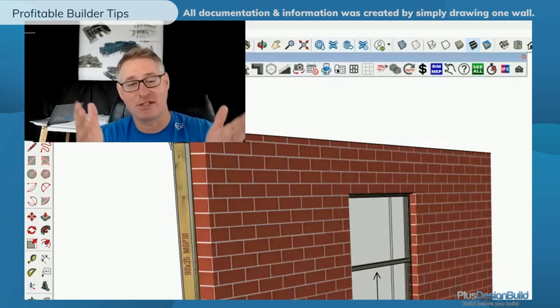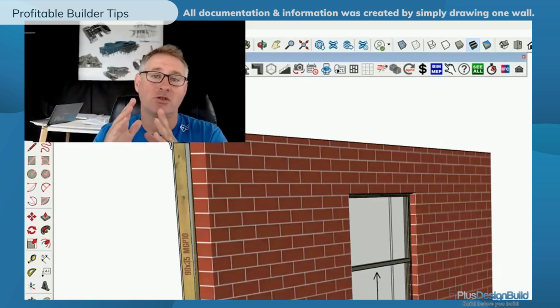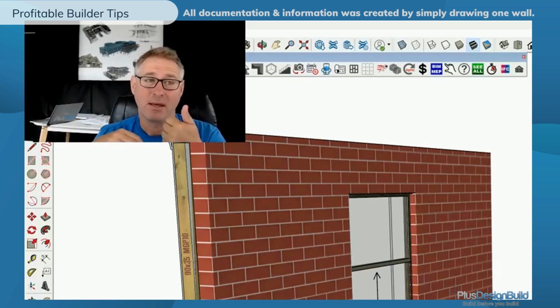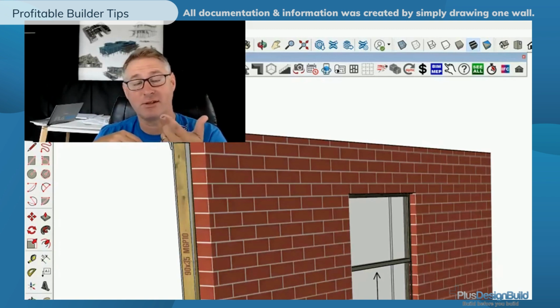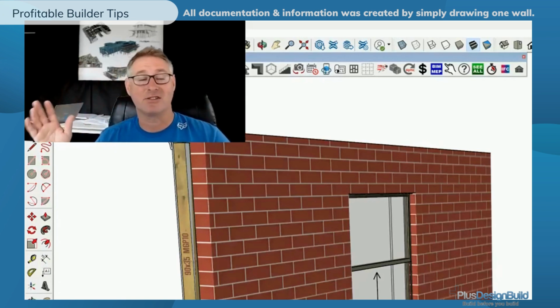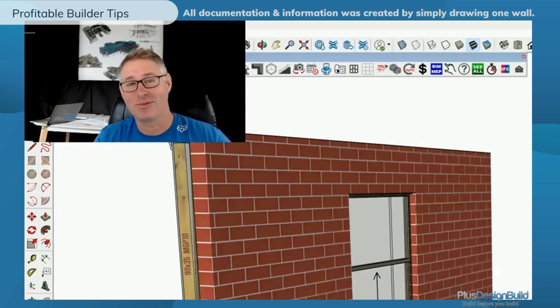Let's say, for instance, you've got $10,000 on the purchase order. It comes in at $11,000. There needs to be somebody to justify why the $1,000 was spent. It could be an estimating error. It could be that the supplier has jacked up their prices and haven't said anything and just sent it across. But the worst thing that can happen is you just sign it off, too busy, it doesn't matter, and there goes $1,000. That's 10% you lost on top of your job. It's coming out of your margin.